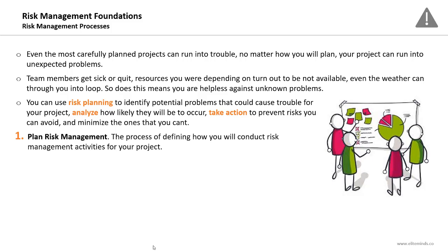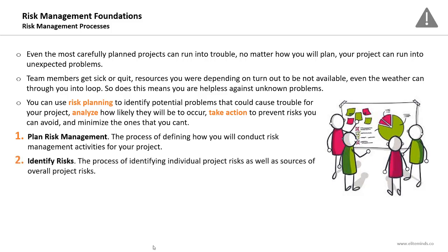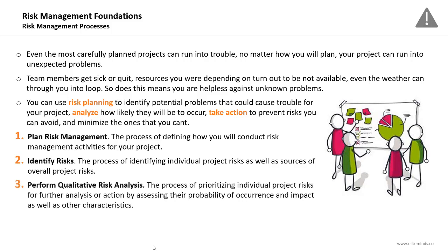The seven risk management processes we will cover in detail start with: Plan Risk Management — the process of defining how you will conduct risk management activities for your project; it's about thinking in advance. Identify Risks — the process of identifying both individual project risks and sources of overall project risk. Perform Qualitative Risk Analysis — the process of prioritizing individual project risks by assessing their probability of occurrence, impact, and other characteristics. Qualitative analysis is primarily about prioritization.